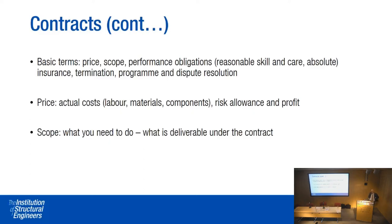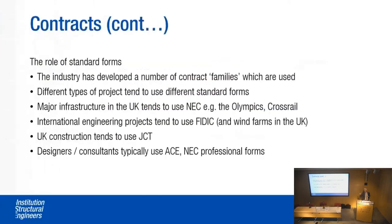A lot of issues I see are simply a breakdown in communication between the client and the party providing services. It is really important to try and define in your arrangement with your client exactly what you are going to do. Invariably, the client will think you're going to do X, Y and Z, whereas you will have priced the fee thinking you only have to do X. If you can be very clear at the outset about your scope obligations, you will save a lot of trouble down the line.